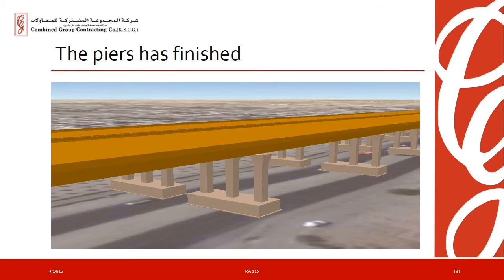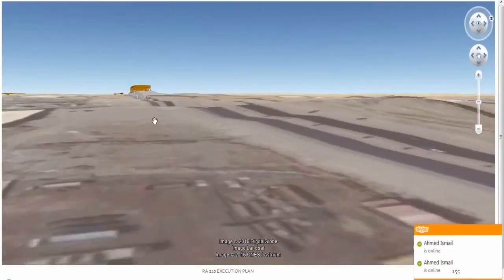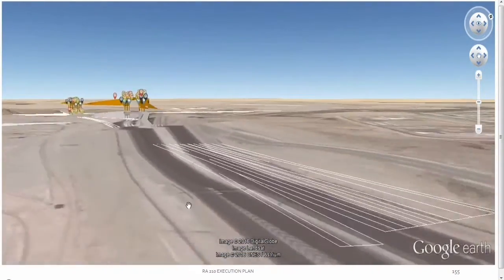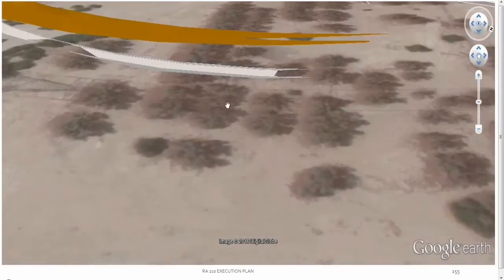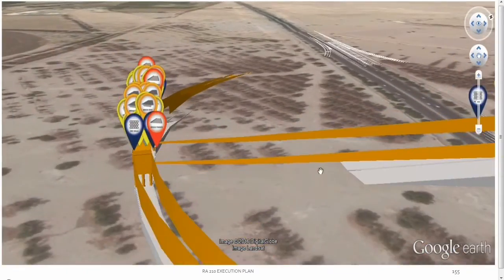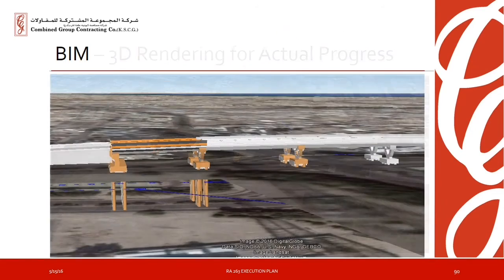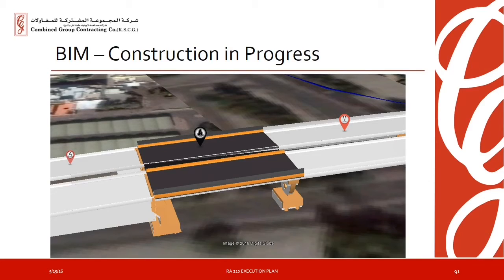So all of this is keyed and coded electronically, reading from the database and from the progress status, with connectivity to the 3D graphics. It will display the proper model, color, and finish, and you'll be able to follow your project's progress live with color coding. And the pins or icons give you a wealth of data, from inspection reports to approved shop drawings to schedule status to financial status.